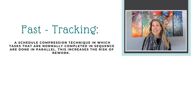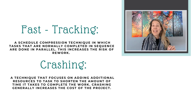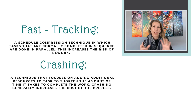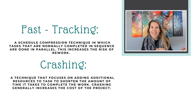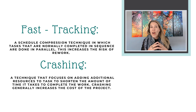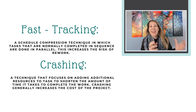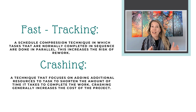The second schedule compression technique that I'd like to define is called crashing. Schedule crashing is a technique that focuses on adding additional resources — we're going to add additional people to work on a task or multiple tasks to shorten the amount of time to complete the work. Crashing generally increases the cost of the project, so that could be the downside, because maybe we're paying two people now instead of one so that we can get the work done faster.